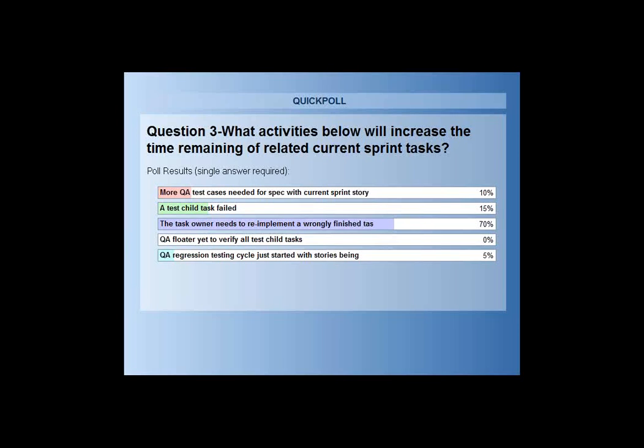In Dev Suite, we actually implemented an automation rule. Whenever a test child task failed, the time remaining minimum needs to be set to, say, 1 hour, 2 hours. So there's no way you can claim this development task is 100% done because there's a time remaining value there.